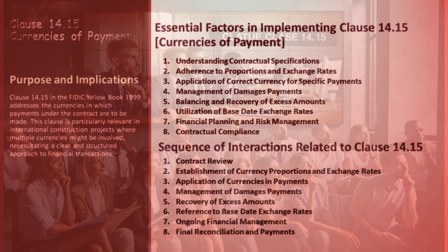If the contract doesn't specify exchange rates, use the rates prevailing on the base date as determined by the country's central bank. Engage in thorough financial planning and risk management, considering potential currency fluctuations and their impacts on project costs. Lastly, ensure that all financial transactions strictly comply with the currency provisions of Clause 14.15 to prevent disputes or misunderstandings.